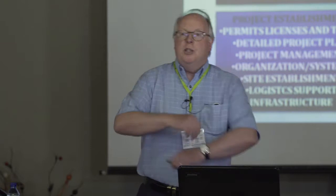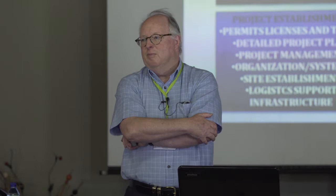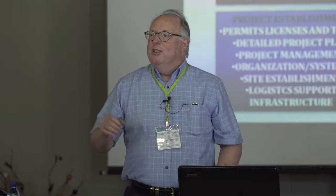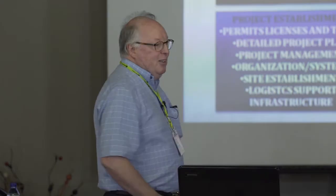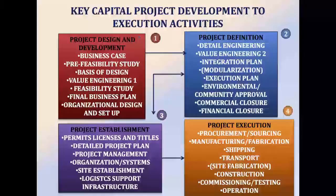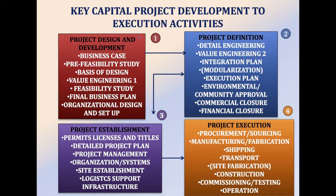Now, what is a capital project in terms of how does it get established? The term 'bankable feasibility study' doesn't exist — it's a myth. What you have to do is you have to have a business case upon which you do a pre-feasibility study, upon which you create a basis of design for your capital project, which you then value engineer to purge mismatches and wrong assumptions. Then you have a feasibility study, then a final business plan, then an organizational design and setup to take the project to the next stage.